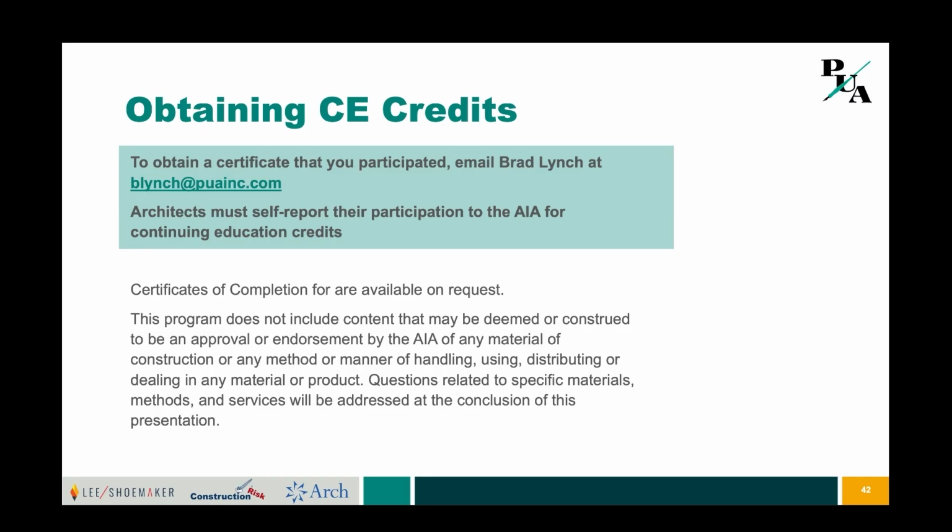So we may even put a clause in there saying this teaming agreement has its own limitation of liability, which is going to be smaller than the LOL for the final agreement, and that is going to be enforceable by the courts. And it's really important, and there have been cases that have enforced that type of a teaming agreement.